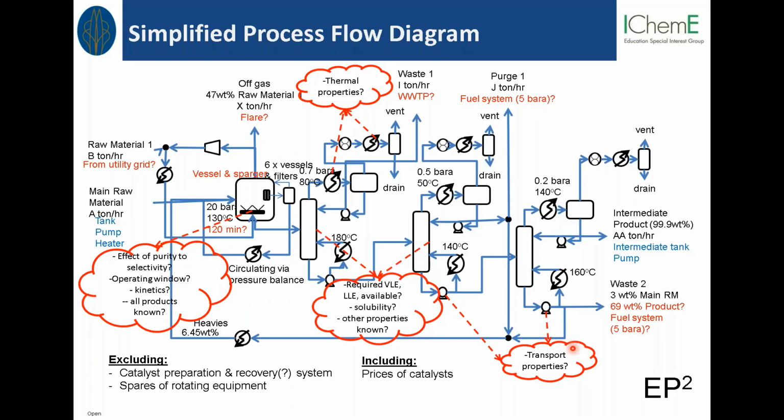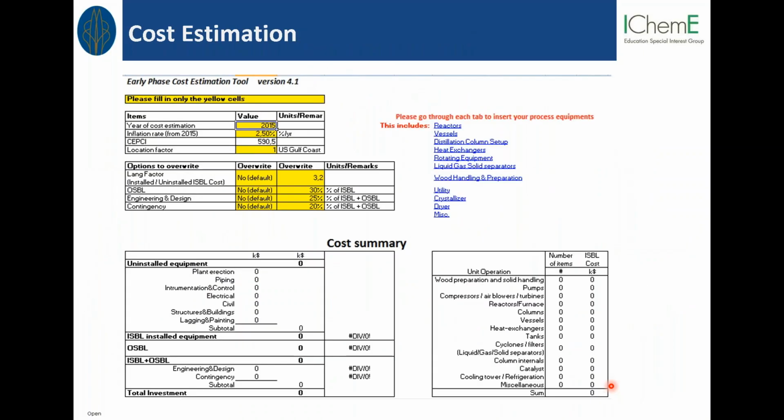And from this, as you can see now, we have more detailed equipment with mass balance around it, so we can have some sort of a feeling on how big the equipment is, which we can then use to calculate our capex and then calculate our economic potential too. So from this exercise, we can try to remove more and more alternatives. We could also do some cost estimations here, and the capex. I put in some in-house cost estimating tool that we have.